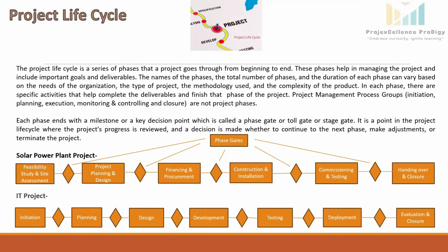So here in this phase, the financing plan and funding source will be finalized. Other deliverables will be the procurement plan, vendor selection, and contracts and agreements with vendors, and the phase gate assessment will be done after the completion of the phase.